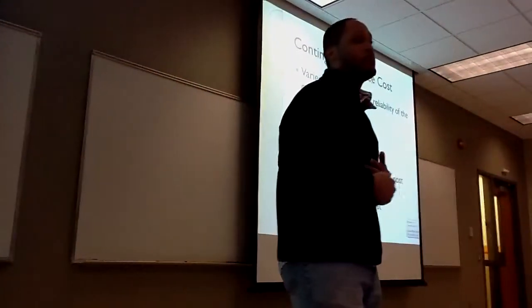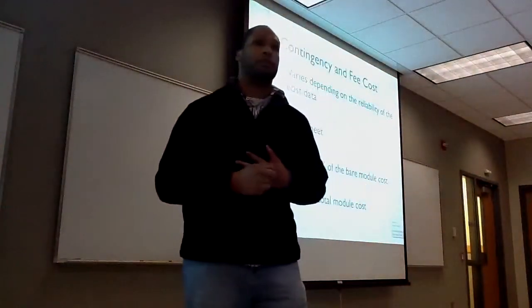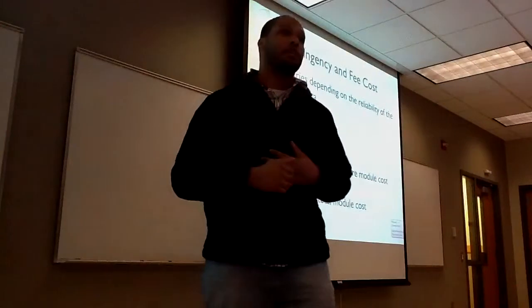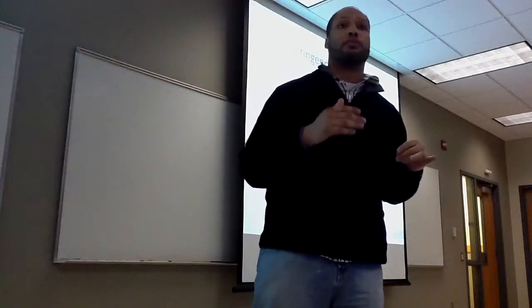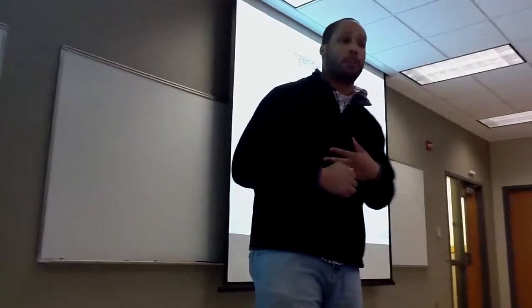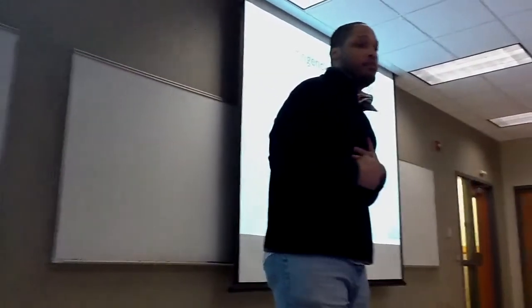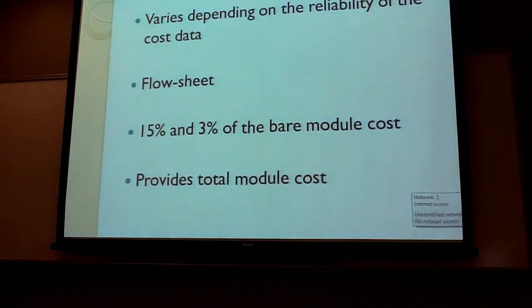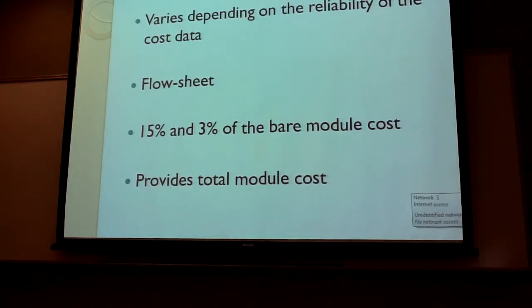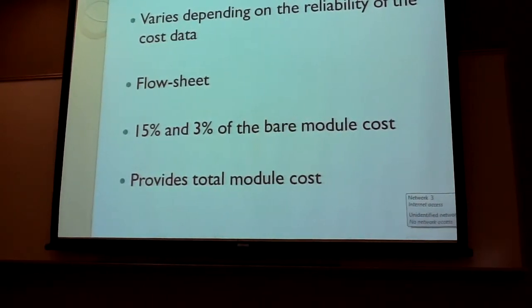Contingency fee costs are very dependent on the reliability of your cost data and the completeness of your process flow diagram. 15% to 3% will be added to your bare module costs, and this will give you your total module costs. That 15% and 3% comes from your contingency fee costs.